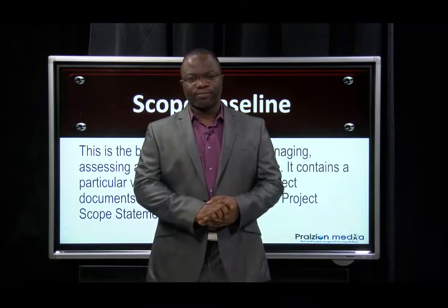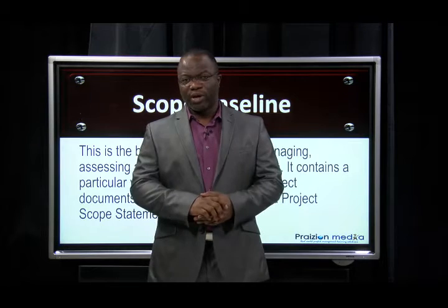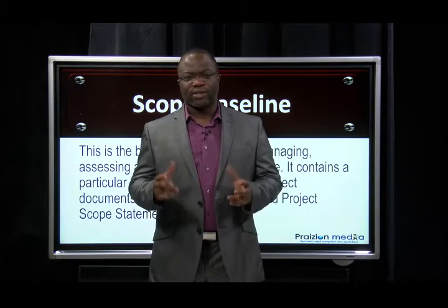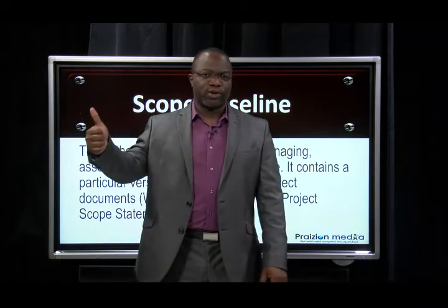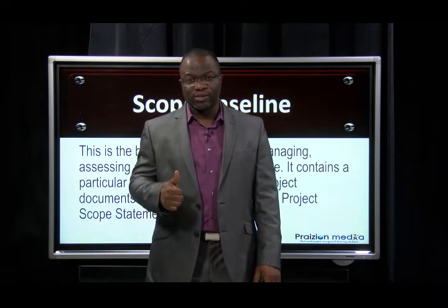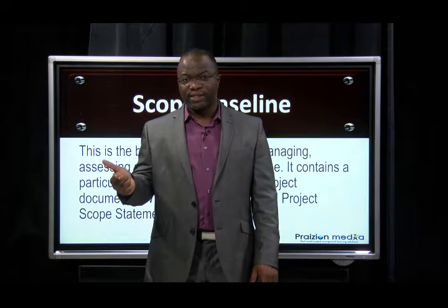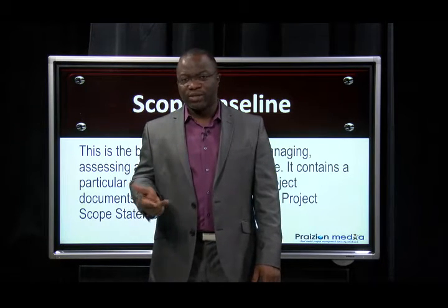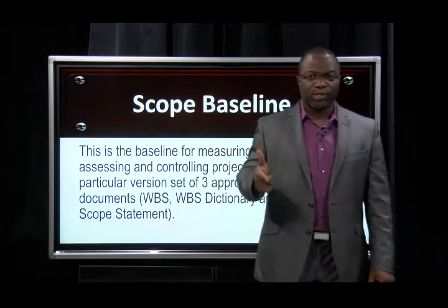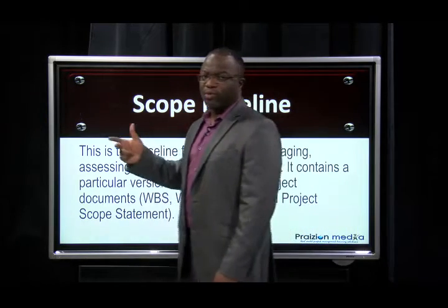Scope baseline. There are three important parts of your scope baseline. Your scope baseline is a collection of your scope statement, also known as project scope statement, your WBS, and your WBS dictionary. Project scope statement, WBS, and WBS dictionary.